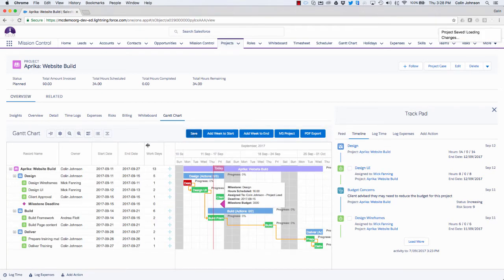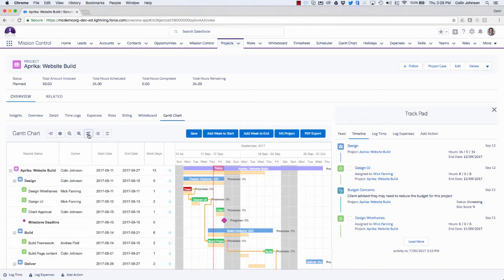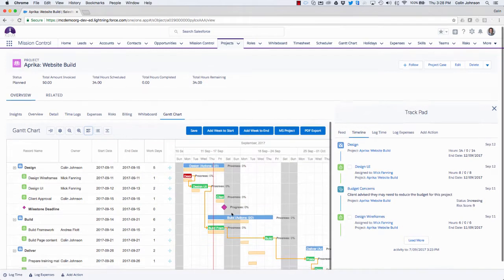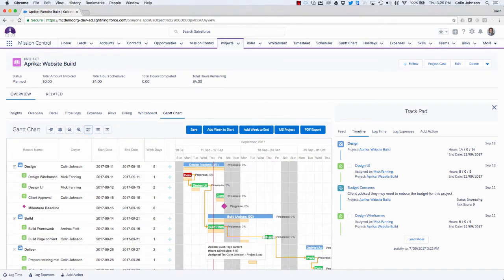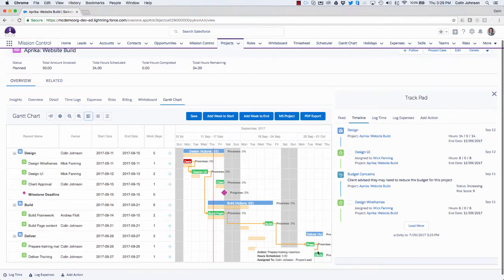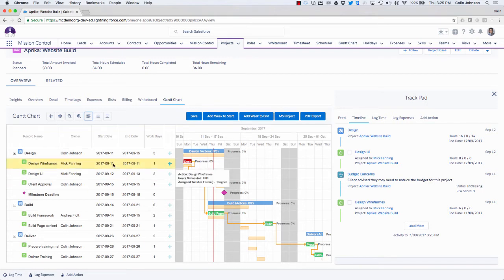So now that that's been done, what I can actually do is load in my baseline dates. If I toggle that one on, so this gives me that ghosted version of the original timeline. So as I'm scrolling down, you can see that these few actions, they stayed on track, but then when I get down to the build page content, you can see that I had to delay that by a few days. And then that resulted in these actions also being delayed. So that allows us to perform that lessons learned process at the end of the project to see how well we delivered against how we thought we were going to deliver.